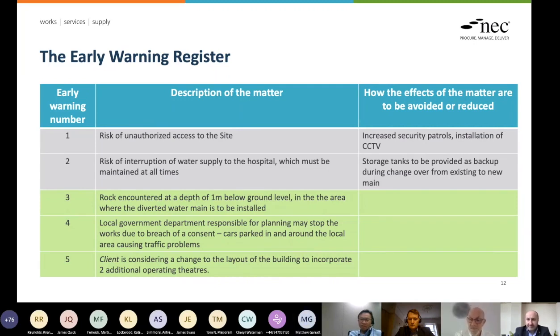I think initially, in the early NEC days, very, very few people attended those meetings, and everybody just found out afterwards what had happened. Decisions had been made and that was it. And then it developed into, well, hang on a minute, these people who are bringing supplies to site, rather than make a decision about their products and services, perhaps we should involve them in it. As a point I made before, somebody can make a decision and say, we're going to move that column over, and it might mean that the piece of steel now needed is on a 16-week delivery. But if they'd involved the steel contractor at the right time, he would say, well, hang on a minute, I've got this other solution. So it's been quite mixed.